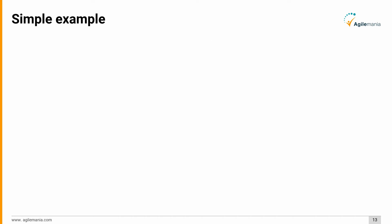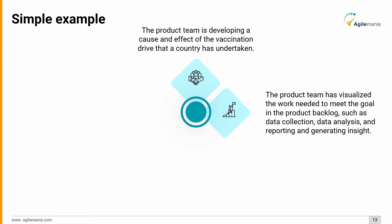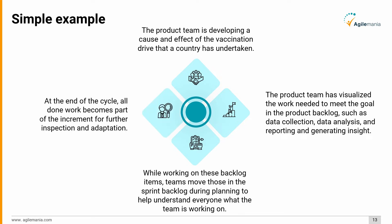To illustrate with a simple example: a product team is developing a cause-and-effect analysis of a vaccination drive a country has undertaken. The team has visualized the work needed in the product backlog, such as data collection, data analysis, reporting, and generating insights. While working on these backlog items, teams move them into the sprint backlog during planning so everyone understands what the team is working on. At the end of the cycle, all completed work becomes part of the increment for further inspection and adaptation.